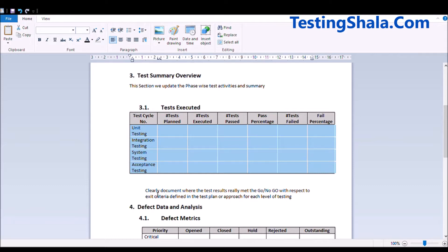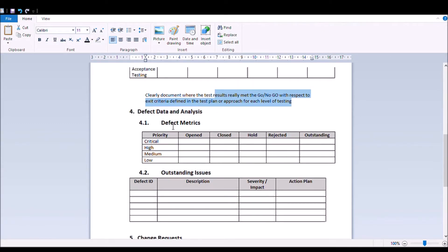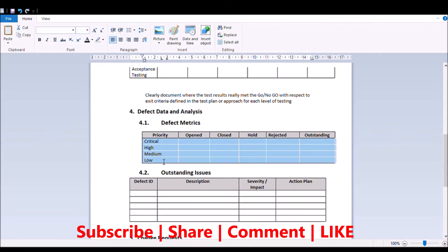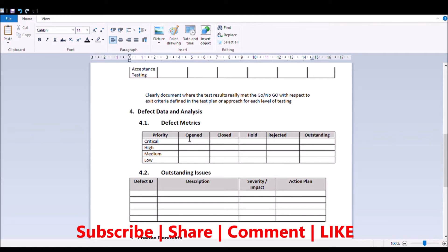We are also going to use this information to define the results for the exit criteria. The next section we clearly call out is defect data analysis, where we call out the defect matrix — the priority of the defects like critical, high, medium, and low — how many defects are open, how many are closed, how many are on hold, how many are rejected, and how many are outstanding.